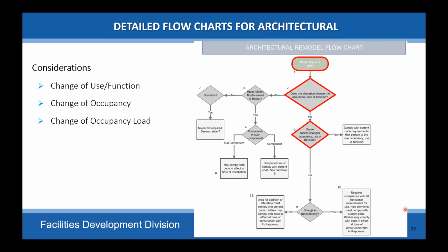So if it was an alteration or change in occupancy, use, or function, does the entire facility change occupancy, use, or function? If the entire facility or even a major department changes use or function, you must comply with the current code requirements that pertain to the new occupancy, use, or function.